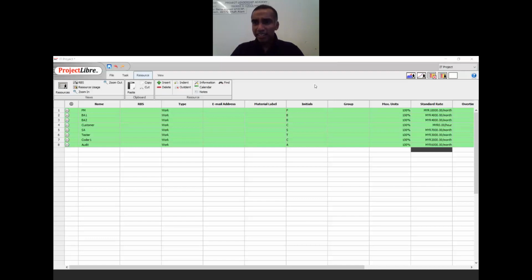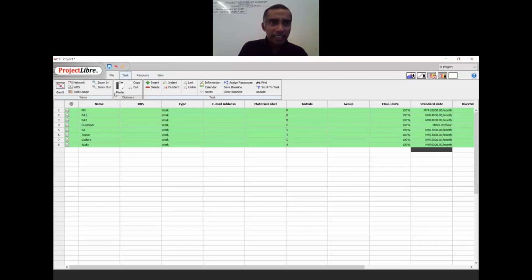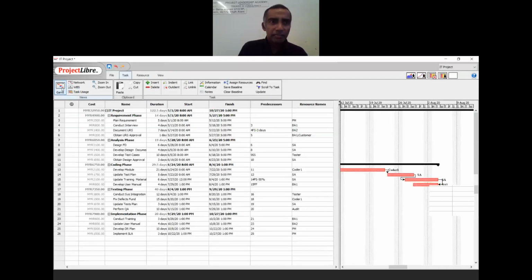Done. That's all. Right. So remember, you need 3 parameters, right? The resource name is already in the Gantt chart. Duration is in the Gantt chart. I just have to enter their salary. So now let's take a look at our Gantt chart. So you go to task, select Gantt chart, and notice your cost is automatically calculated. How do you get 2005? This person's rate and this person's resource name, the rate, and also the duration is based on that.